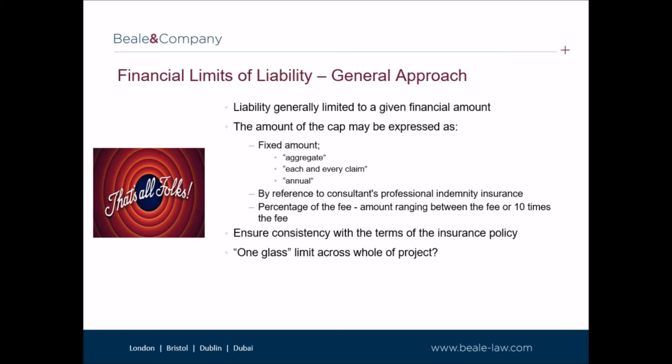Consultants should not be agreeing to financial limits of liability which expose the consultant to losses in excess of the cover available. Therefore, negotiating limits of liability clauses should go hand in hand when negotiating the limit of indemnity for the professional indemnity insurance to be maintained.